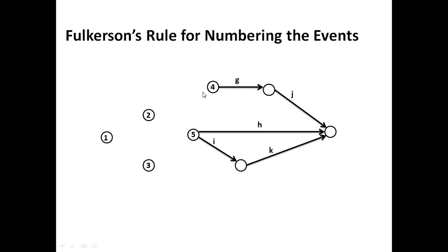After removal of the outgoing arrows from the second and third node, this and this are created as initial nodes, because again there is no incoming, so that is why these are the initial. Next we'll give 4 to the topmost node, and the next number is 5, which will be given to this node.